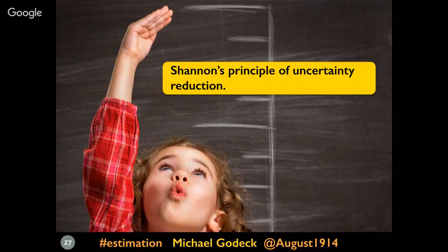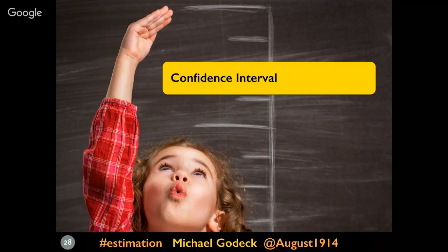So the first thing we learned from Shannon is to estimate in ranges instead of point values, right? Ranges are qualified by probabilities. So with range estimates framed with probabilities, you don't have to commit to anything that you're not sure of, since the range and the probability reflect your uncertainty already. And so if you have no clue, then you just widen the range until it does reflect what it is that you do know. So I realize it's a little dense, so we'll drill into it a little bit here.